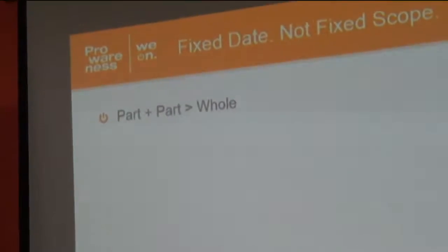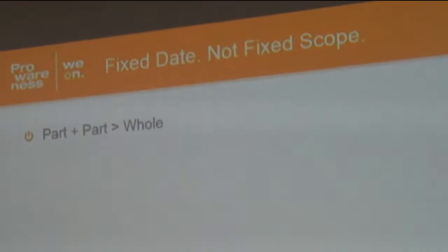And this, I think, is something most POs are guilty of. You change the scope but not the date, right? I see a lot of smiles, especially the Prowareness guys. Yeah? So you end up saying, okay, this is again the breakdown of stories. Your team said, okay, 10 points for a story, and then when you broke it down, you ended up with 12. The POs don't take that into account.